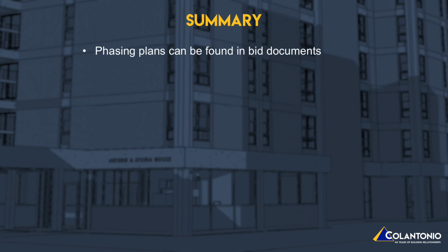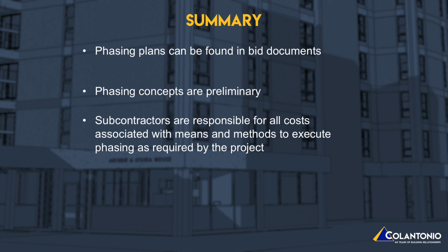Please note that the phasing plan shown in this video should be thought of as preliminary and for bidding purposes only. As I previously mentioned, final phasing and logistics concepts will be refined in conjunction with awarded trade and non-trade subcontractors. Subcontractors will be responsible for all costs associated with their means and methods required to execute this phasing as shown and any possible methods by which to improve upon the described plans.